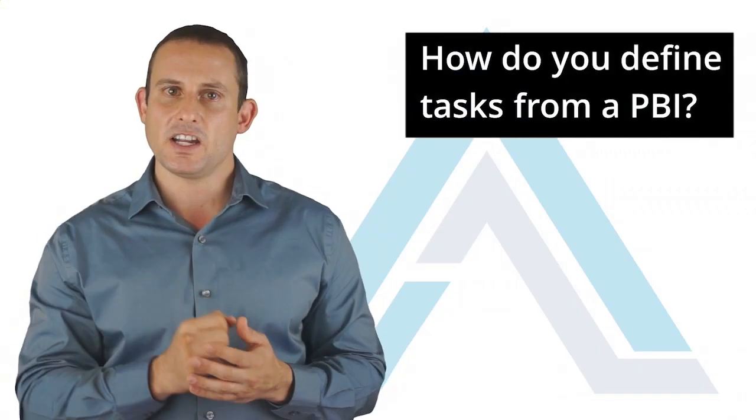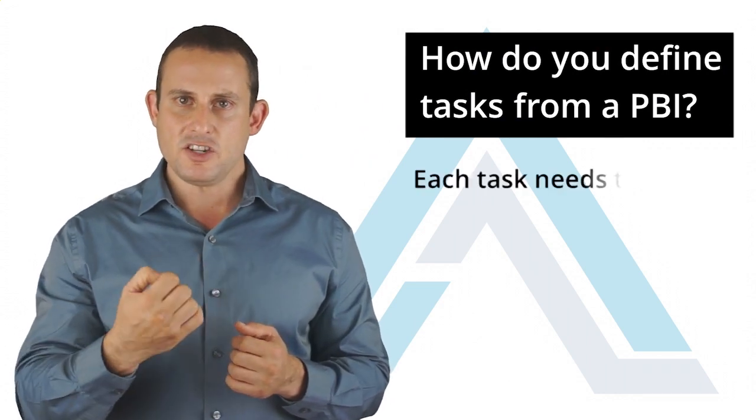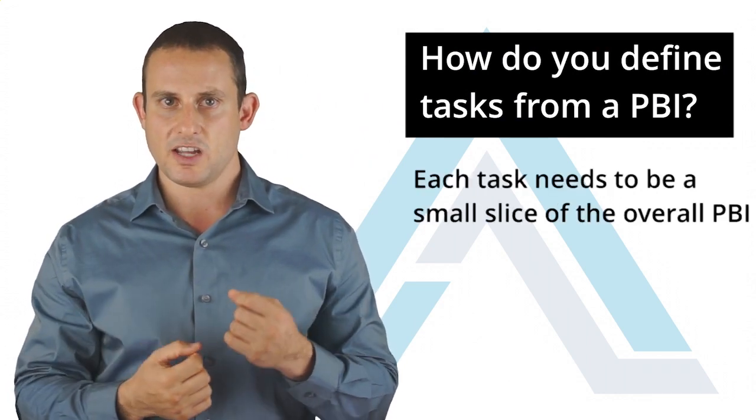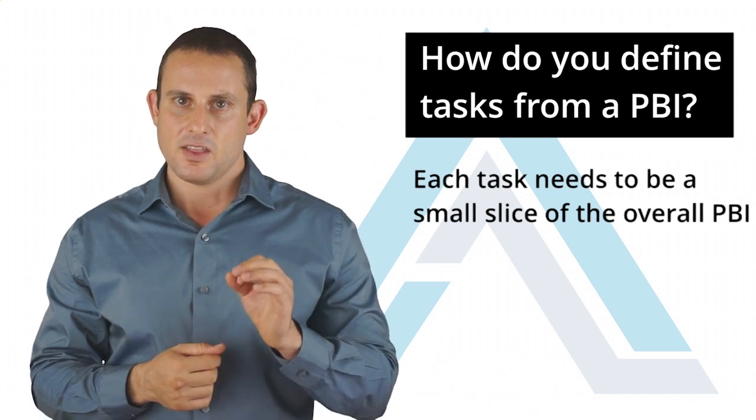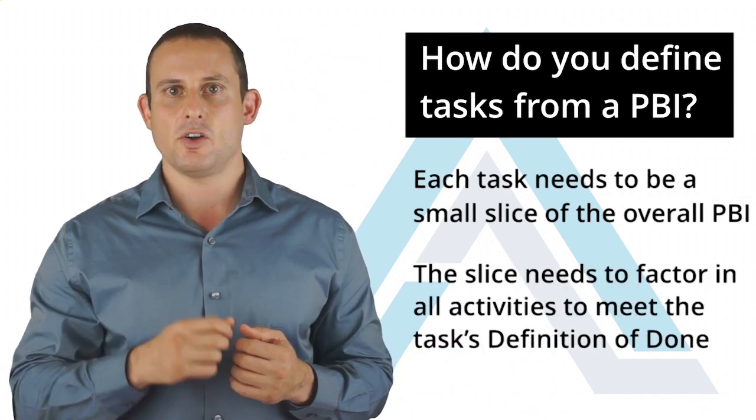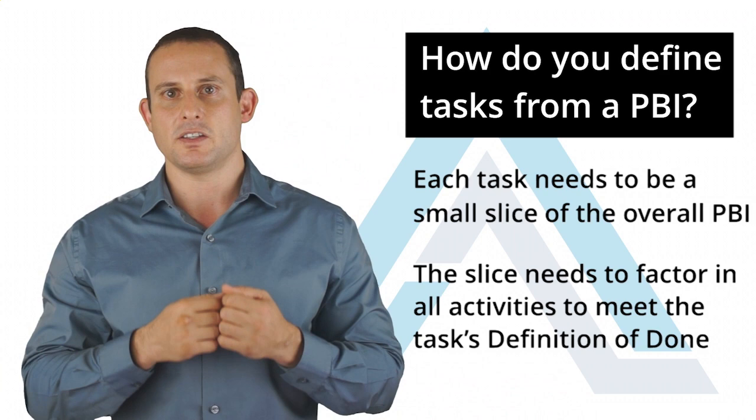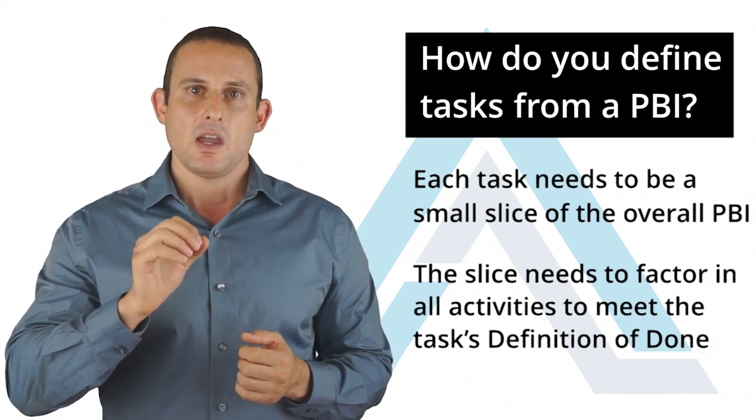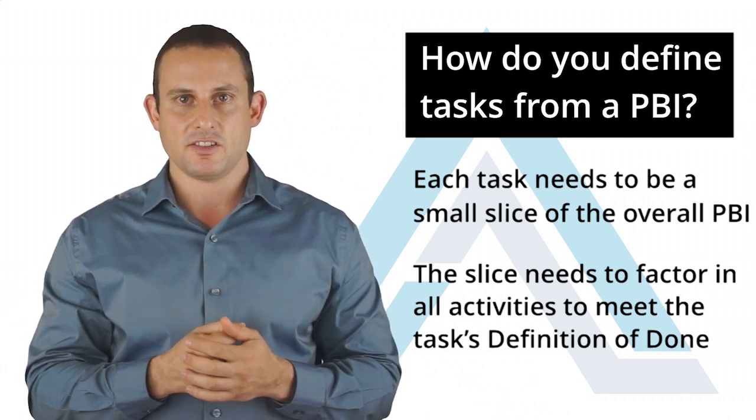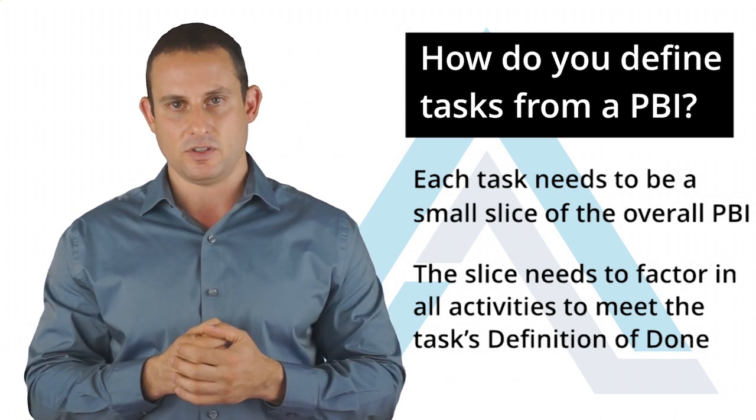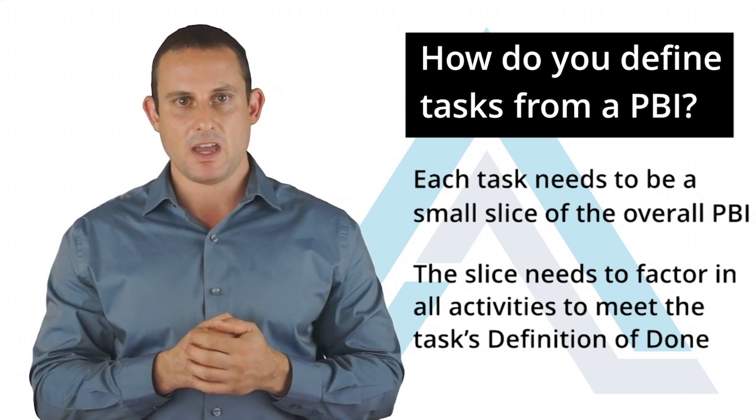So how do you define tasks from a PBI? Well, each task needs to be a small slice of the overall PBI. This slice needs to factor in all activities required to meet the task's definition of done. It is my preference that each task should take no longer than eight hours. But the less time, the better in my opinion.